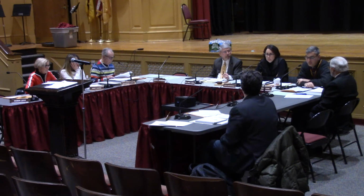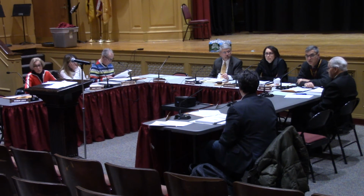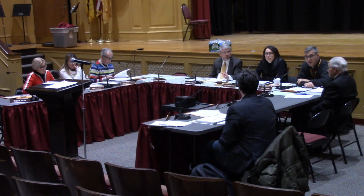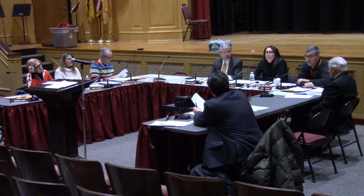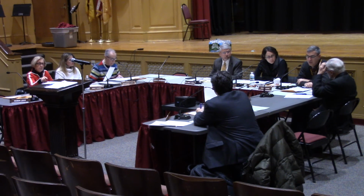Actually, I prefer that we have a discussion this evening and agree to the initial scope. It is an initial scope, it's not a final scope. So if there is something that you want to include or add on, there's plenty of time for that, because the initial scope means that they would actually price out these options too for us. The initial scope is that we would all be telling you only price this. Yeah, so let me run through it. I'll give you an example.